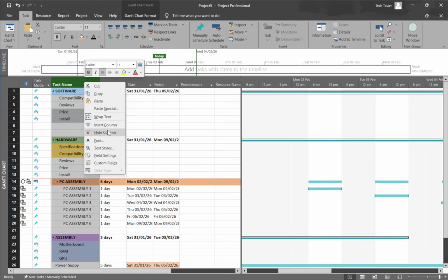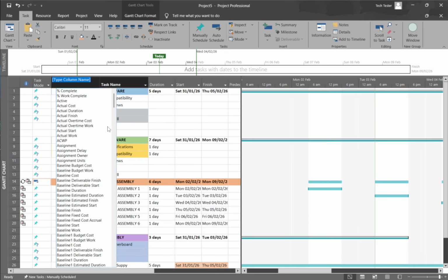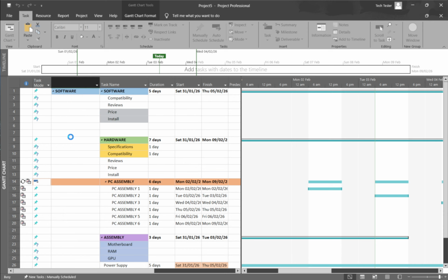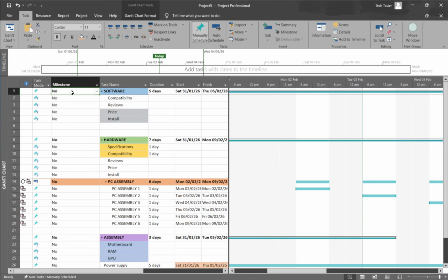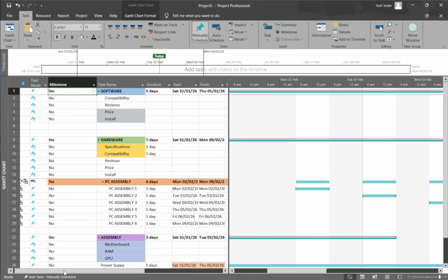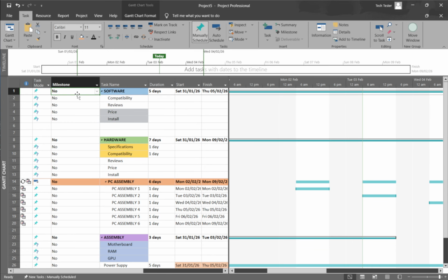Move to the Duration field for that same row, type 0 days, and press Enter. As soon as you do, Project converts that task into a milestone and shows the diamond symbol on the timeline. This is perfect for milestones that represent an instant in time, like a sign-off or a launch date. If you don't see it where you expect, check your Start field or your task links, as the milestone will follow your scheduling logic.